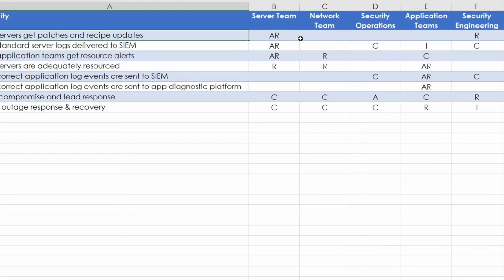And there are several rules when you're creating one of these. I'm going to get a little salty, but A is the most important to get right. For each capability, you have exactly one A. You may not have 2 A's. You may not have 4 A's. You have 1 A. You may not have 0 A's either. Only one team has the sign-off, the one to blame if it doesn't happen right. Yep.